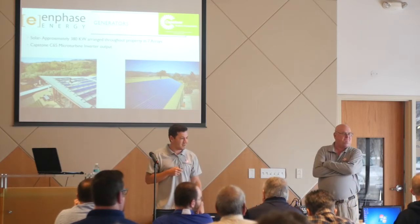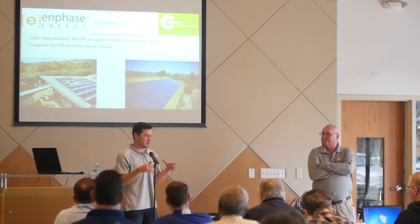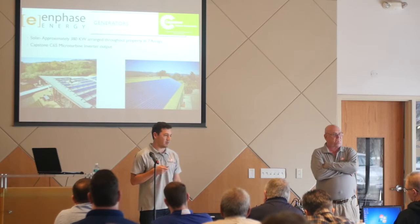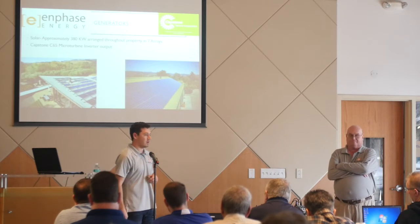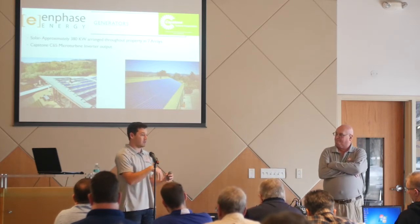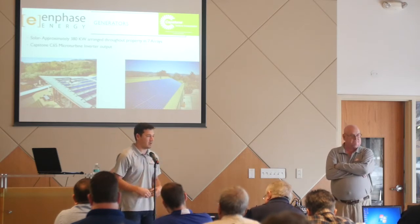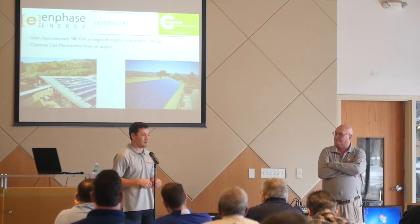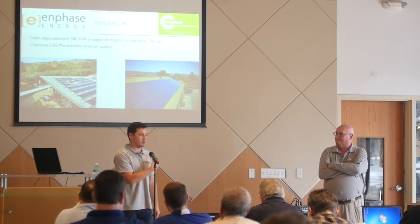So was there utilities already? Yeah. So like Craig said, there were 7 incoming utility meters. Some of them were 480 because it was industrial, there's a shop on site that they use drill presses and 480 volt equipment. And then a few of them were 208 3-phase and 240 split phase. So we had to connect all of those together. So our main trunk line that we've connected all those meters together is now 480 volt 3-phase. And it's the largest trench that we had to dig on site between all of our meters. So that was the main haul of upgrading our infrastructure to be able to do the production that we have on site now.